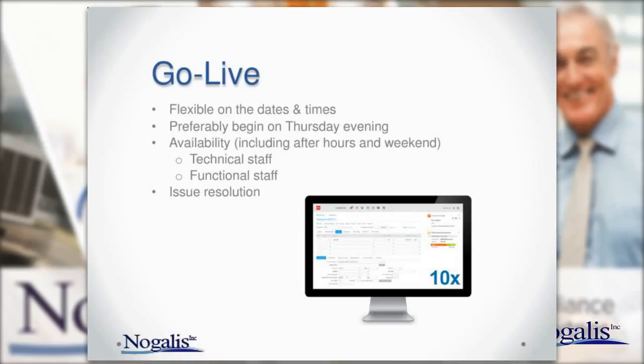So really, it's just a matter of which weekend is everybody going to be available and willing to work very, very hard for one weekend. That's the weekend I would go with, and I would pick the earliest possible weekend, because you can never move things up after that. Usually you can only push them back.